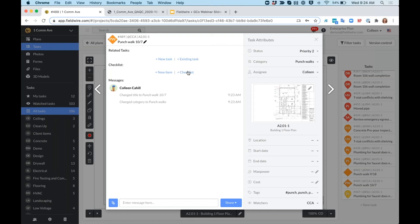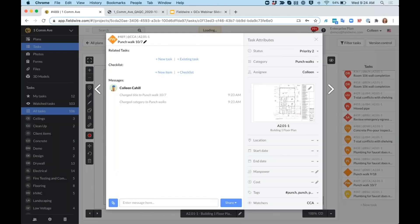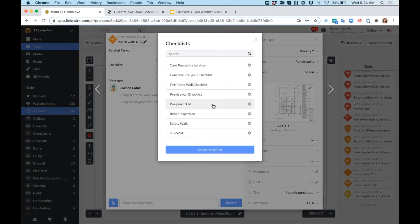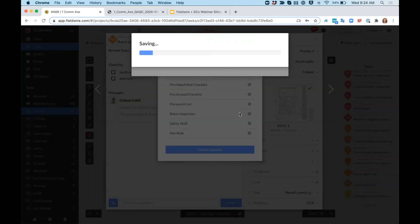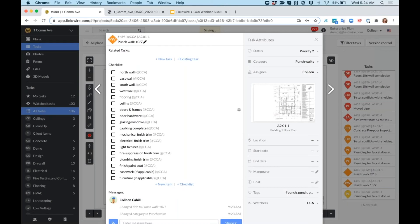I have a checklist that I use over and over again every time I do a punch walk. So similar to the QAQC punch list, I don't want to create a new punch list, I'll just add my pre-punch list checklist and post it to the task. Again, these checklists allow your teams to be really consistent and make sure that they're getting every last detail.